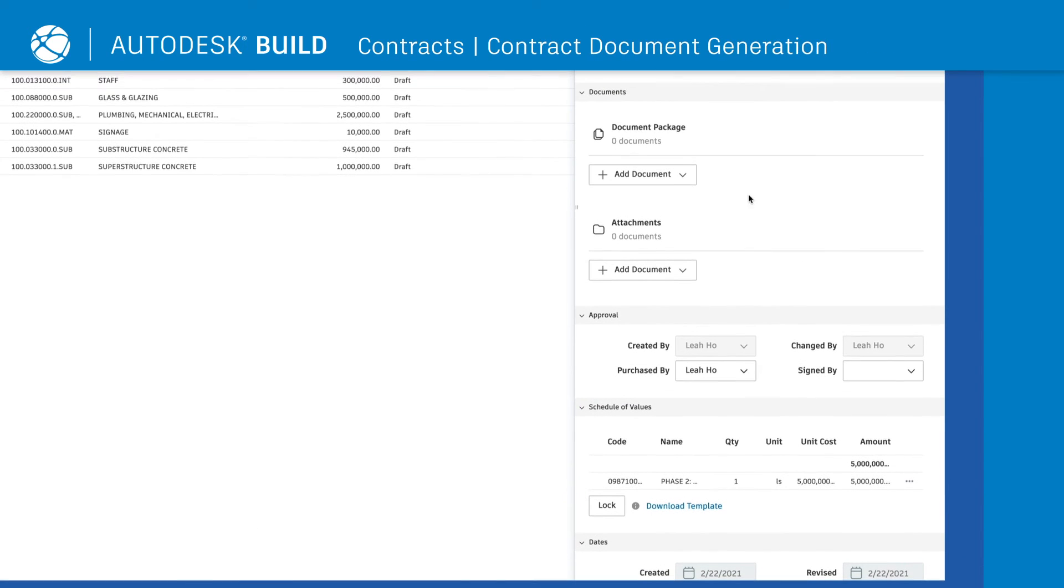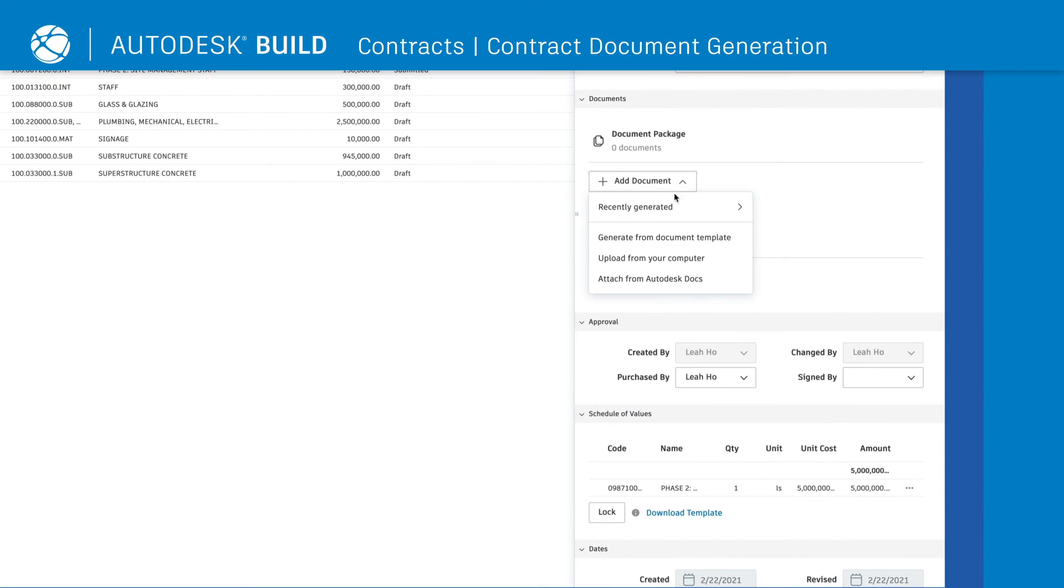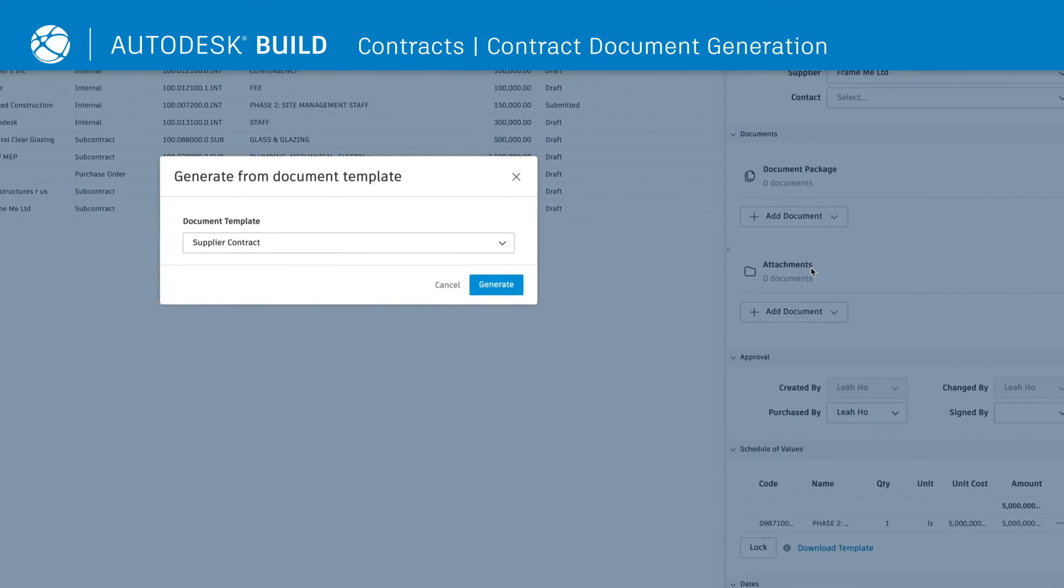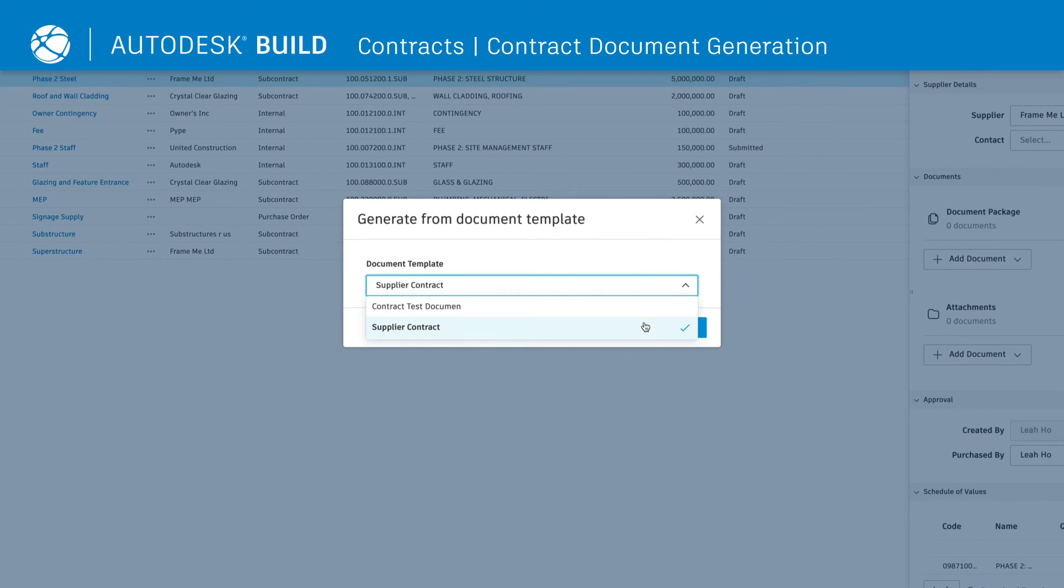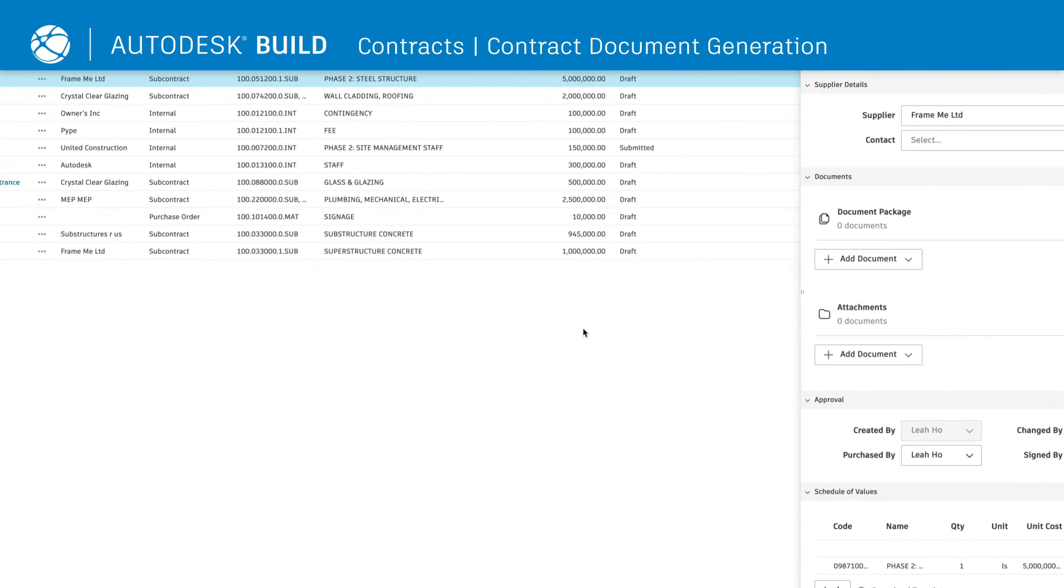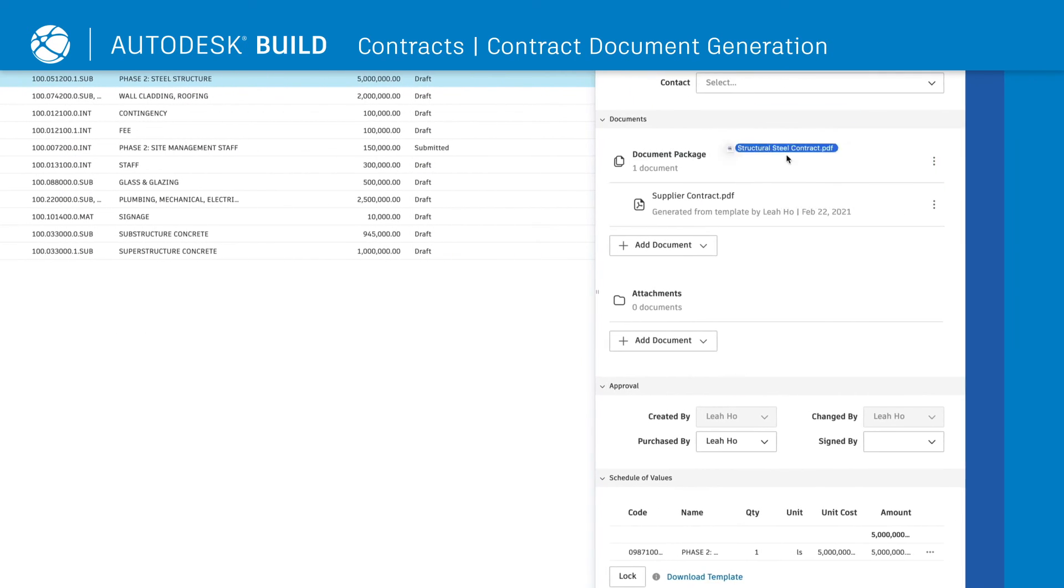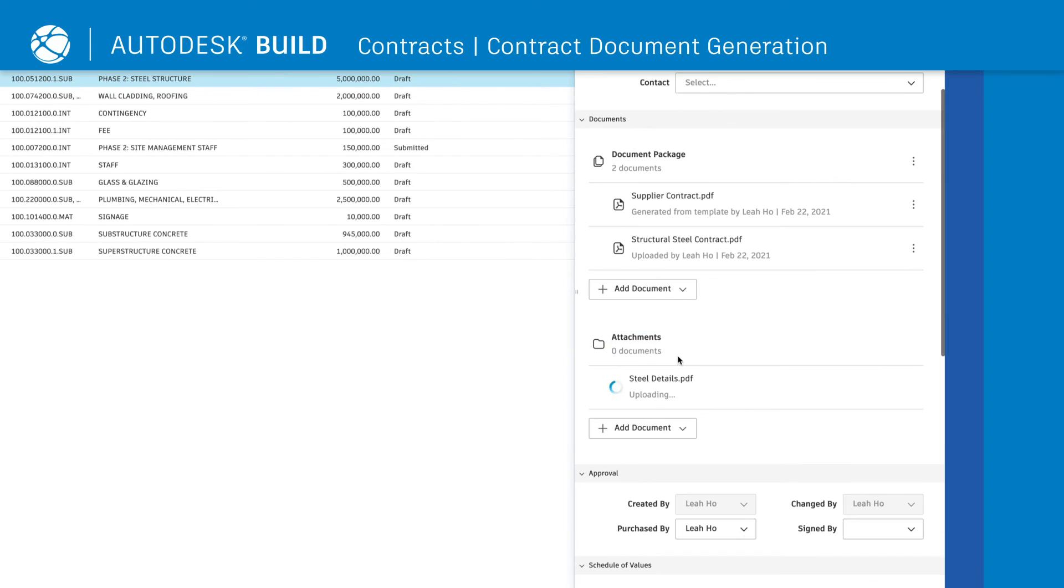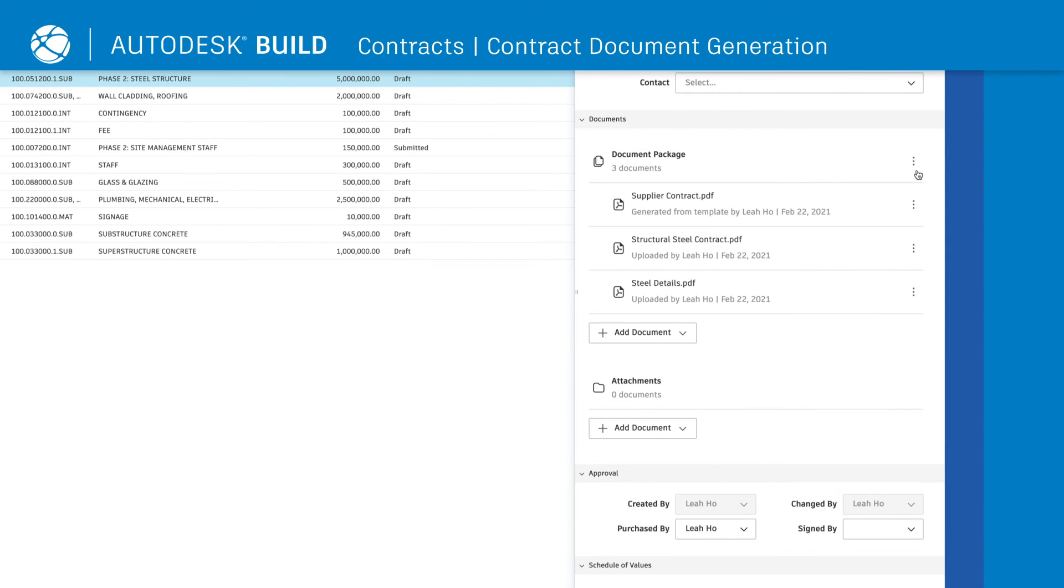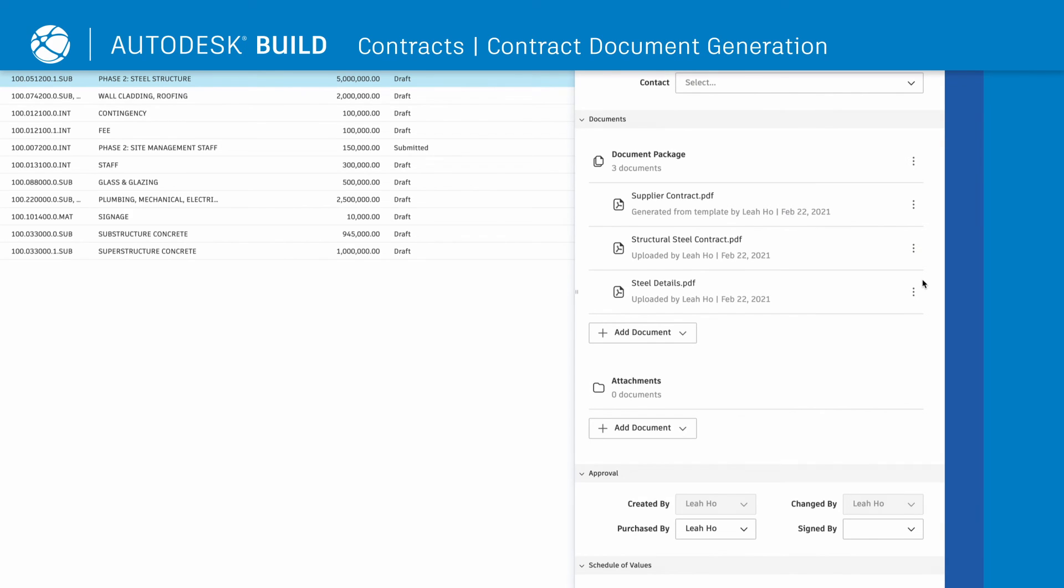Lastly, teams can streamline contract document creation with document packages. Add documents by using document templates, dragging and dropping, attaching files, and moving attachments into the package. This creates a single package that can then be downloaded and distributed for e-signature.